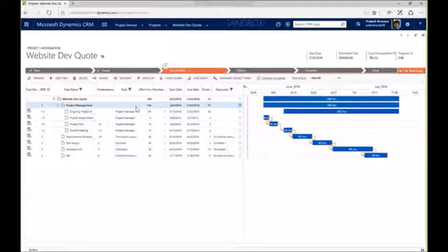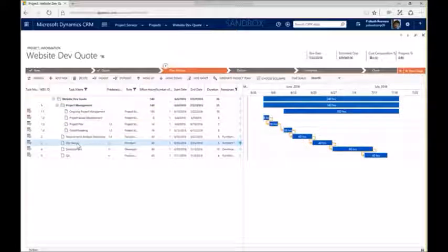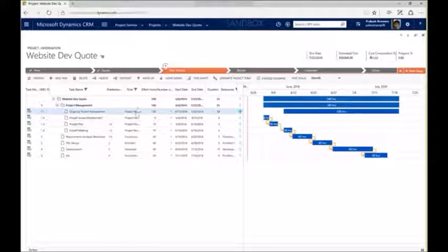Okay, so I've got some project management tasks. I have a scope development. I'm going to do a project plan for a kickoff meeting and execute that. Then we're going to have a workshop on requirements analysis with the client, do some architecture and design development and Q&A. Okay? So those all flow together for about 340 hours of work on this. And that's going to be accomplished by a few different people. If I look at my roles here, let me just expand this out, and you'll see that I have a project manager, functional consultant, architect. So 3 or 4 different people will fill roles on this project.